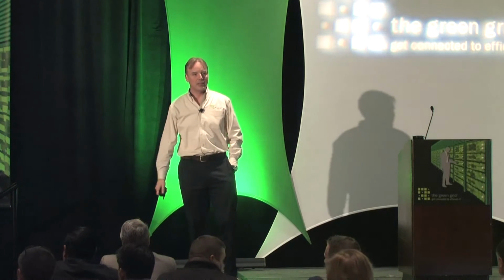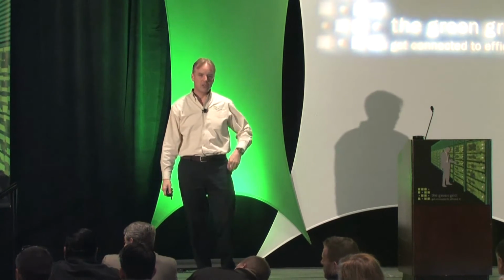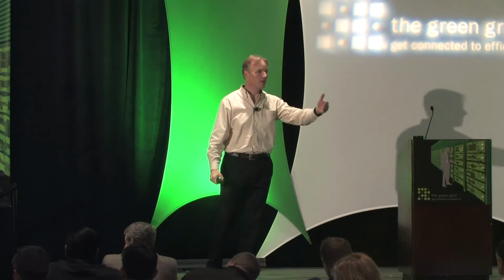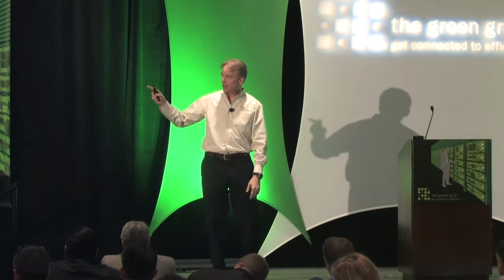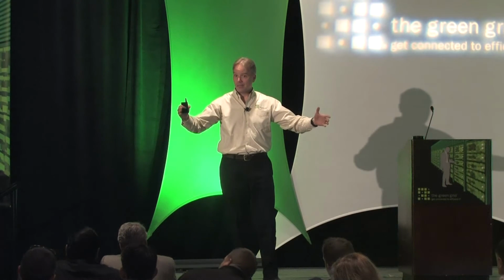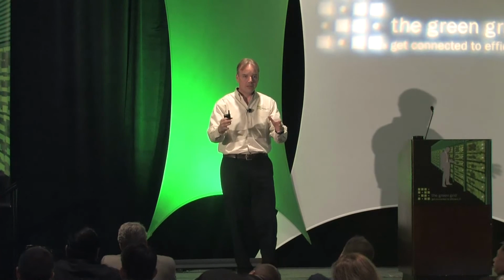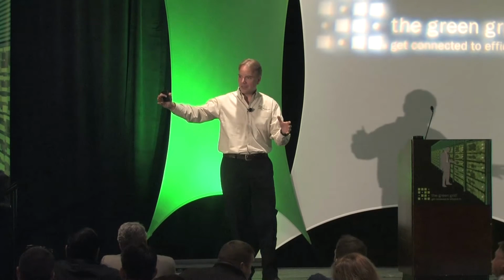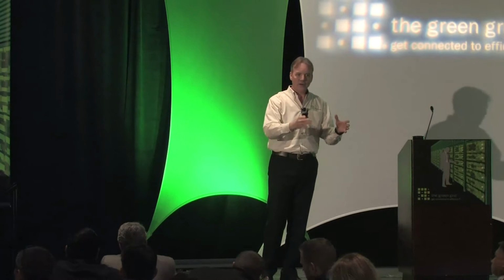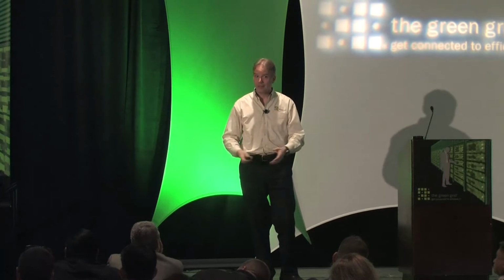And then we realized scaling this infrastructure-wise in 2 megawatt chunks made a lot of sense. So we're adding 2 megawatts of infrastructure, consume it to a certain point, pop, we do the next 2 megawatts, and we keep scaling up from there. The other key was the site is built for end state, meaning that we're not just building up to here. We're not building 4 megawatts. We're building to 12 megawatts of IT, and we're deploying 4 megawatts first. And we've already kicked off the next 2, but it will scale to 12 over time as we need it.